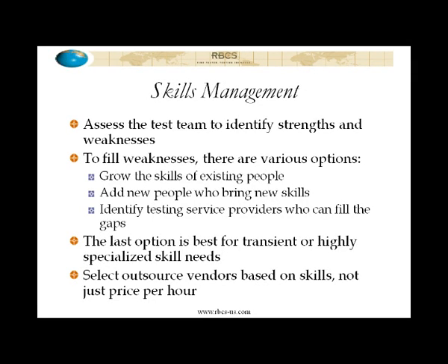So, yes, the approach to doing this is first you do a task analysis, which is just a fancy name for saying you sit down as a manager and you look at over the last N number of projects that we've done, however many you've worked on, 5, 10, whatever. What are the tasks that we had to carry out? Now this is going to be a lot easier if you have something like a Microsoft project file or other sort of Gantt chart that allows you to go through and review the tasks, right? And you come up with a common list of tasks that you had to carry out.